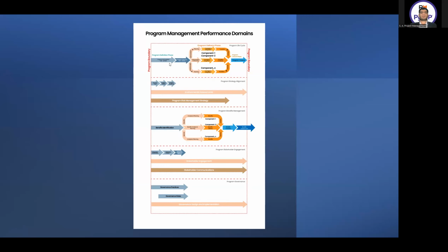Now, moving on, the next thing is planning. Now I have the business case, I have the program charter. So the next thing is I try to create the plans. When I say plans, it's an integrated program plan, which would be made up of subsidiary plans: our resource management plan, quality management, cost, risk. So all the subsidiary plans we go ahead and create. All right. So then we have a set of plans. Now we'll have to run the engine. Now we have this program delivery.